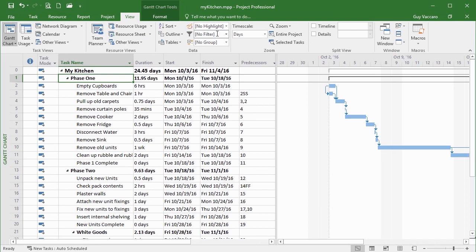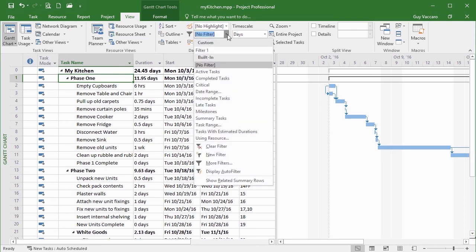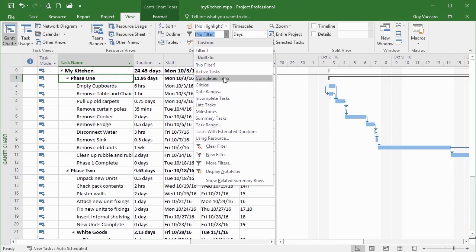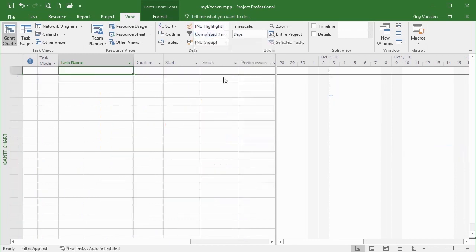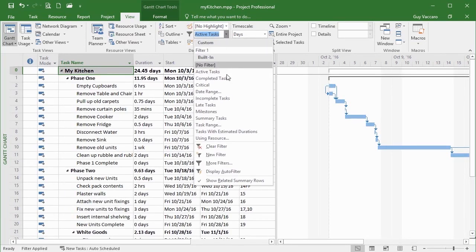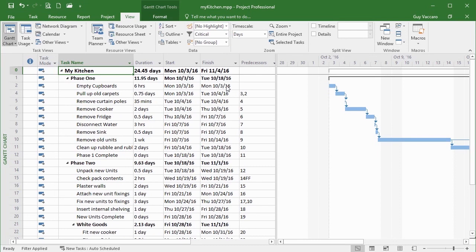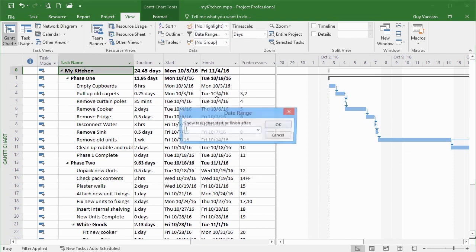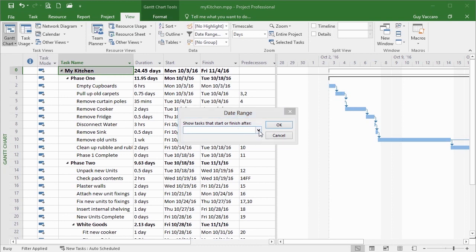That's done on the View ribbon as well. Here's the Filter section — it has a drop-down arrow with some predefined filters. You might like to filter by active tasks — in my particular project that's all of them since we haven't done anything yet. Same with completed tasks — nothing is done, so if I choose that, all my tasks disappear. Come back to active tasks. If I choose 'Critical,' only the tasks that are critical get shown — I'm now losing task three.